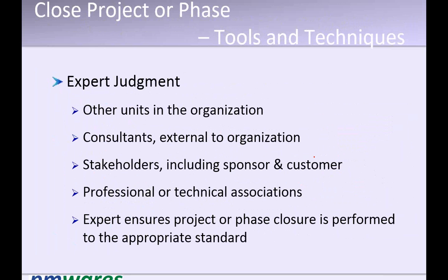We should remember that there is a closure for procurement also. When the procurement is complete, you need to close the procurement, similarly to how you are closing the project. But because procurement is a part of the project, the procurement closure happens before the project closure. We also call project closure an administrative closure. If administrative closure comes up somewhere, you think of it as project closure. When project closure happens, everything should be closed before we close the project. Therefore, procurement should be closed before the project closes.